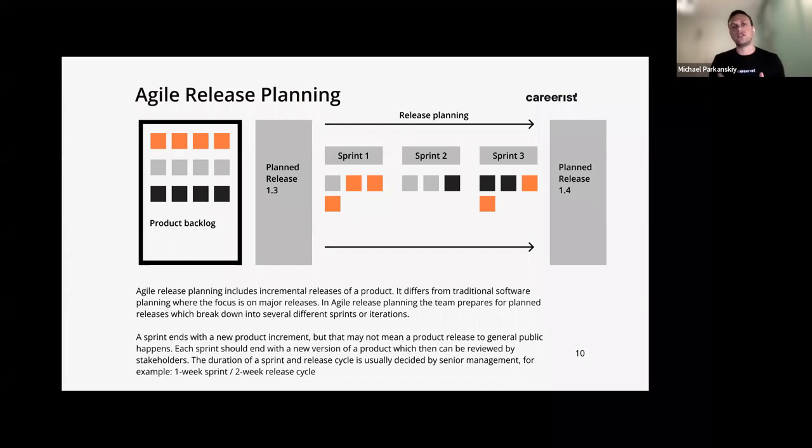Your team chose to use this Scrum system because it may be the best one for the software you're building, because it may be the best at getting feedback from your customers and releasing features as fast as possible to your customers. And sometimes Scrum doesn't work for everyone. Maybe Kanban is better. With Kanban, you don't have these sprints where you have to accomplish certain things in 2 weeks. With Kanban, it's just ongoing. You see a feature you need to build, you build it, you move to the next one. You don't have sprints. Maybe that's a better way, but it's not the wrong way, just another way.